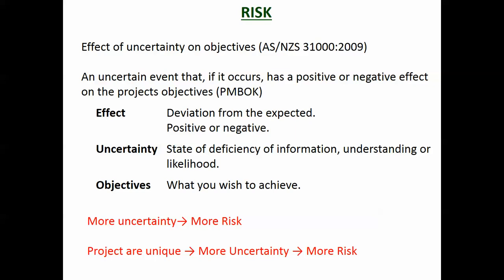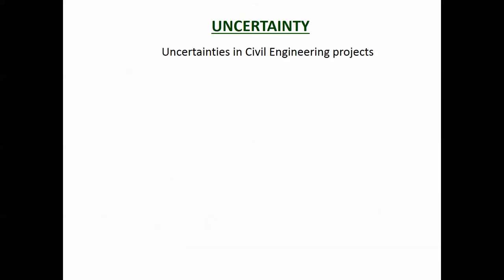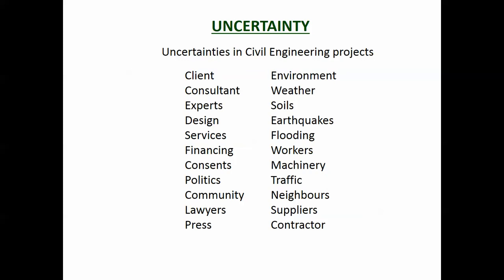Now, civil engineering projects are more so than most other types of projects. The reason for that is we are working over large areas of land. We are working in soils that are materials that were laid down millions of years ago. We don't know exactly what it's going to look like below the soil. We're working outside. We're working in the middle of a community, so there are people around. So there are obviously safety issues. People might wander onto your site, so that's affecting your objective of doing the work safely, and you have to do something about that. We're exposed to the weather, so it can rain.